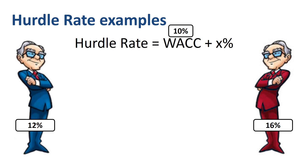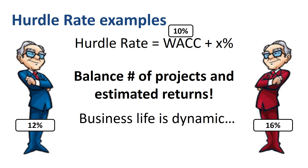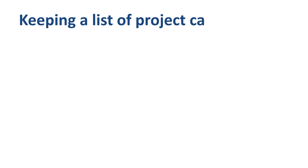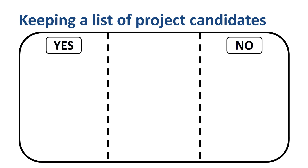Setting a relatively low or relatively high hurdle rate is a balancing act between the number of projects to consider and the estimated returns. The higher the hurdle rate, the lower the number of projects submitted. As business life is dynamic and conditions change all the time, it might be a good idea to keep a running list of project candidates — with three possible responses to investment proposals: yes (approved), no (rejected), and not yet (the parking lot).